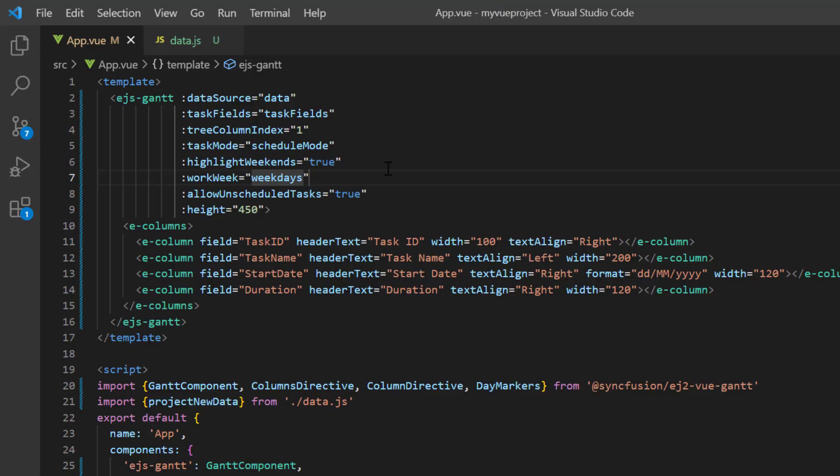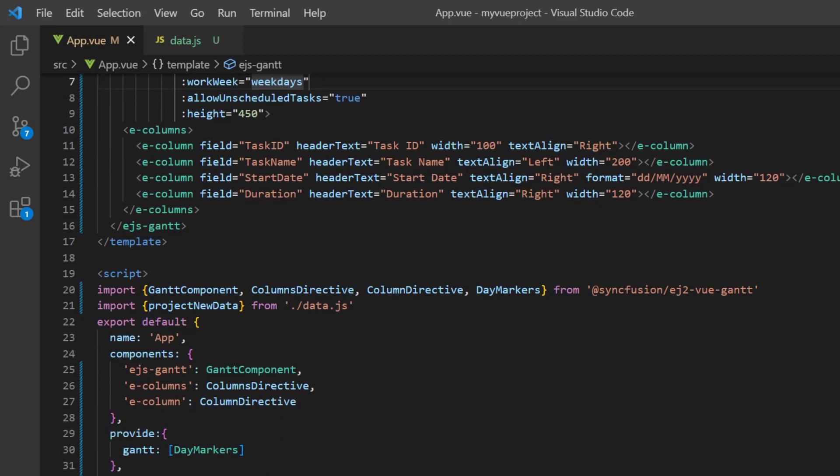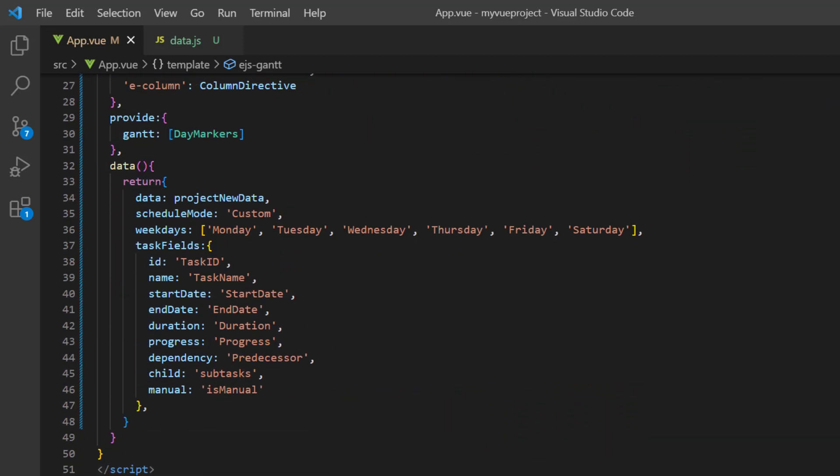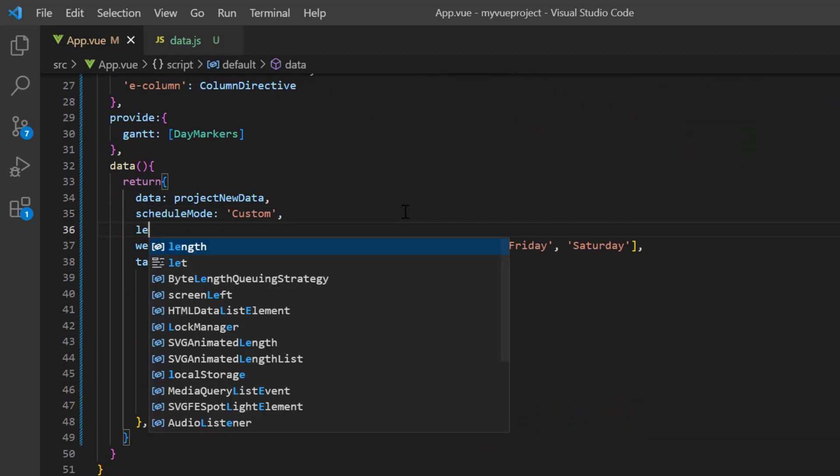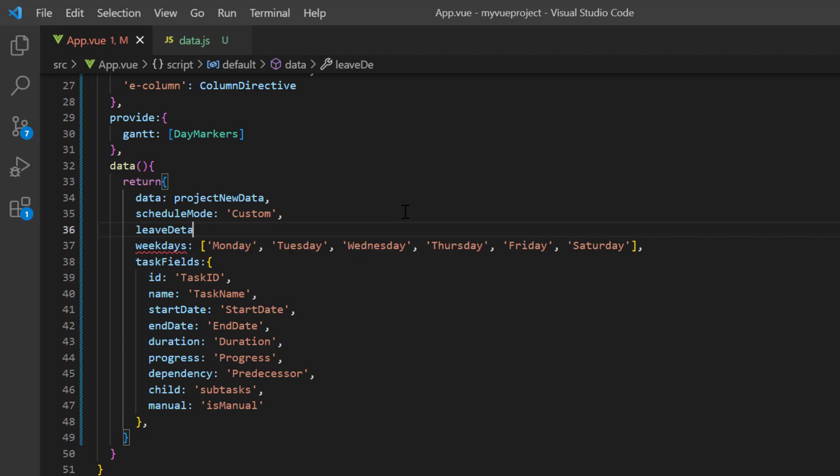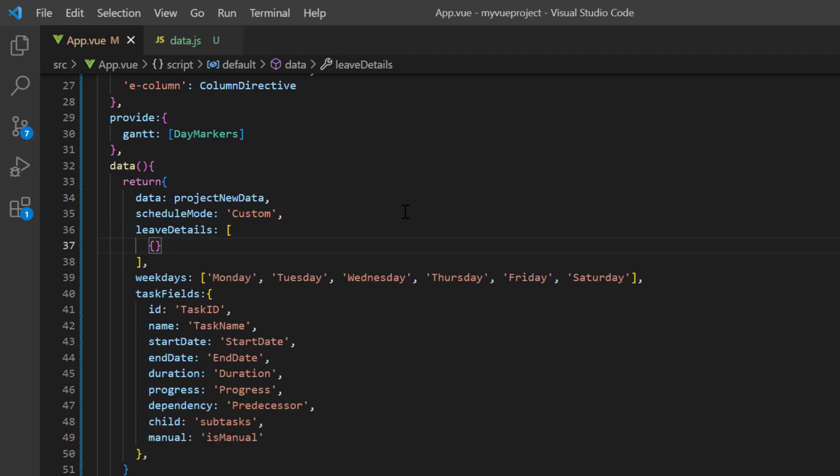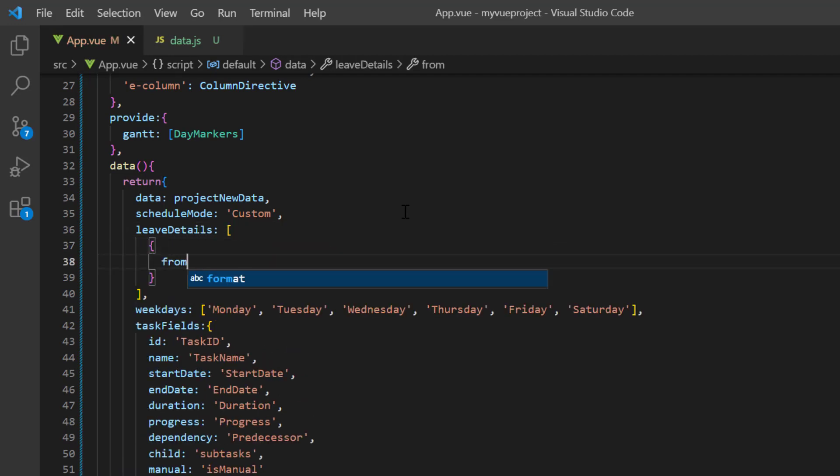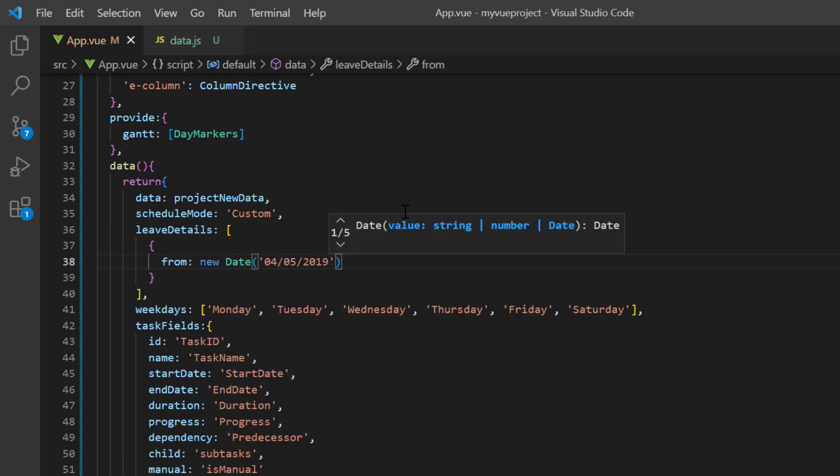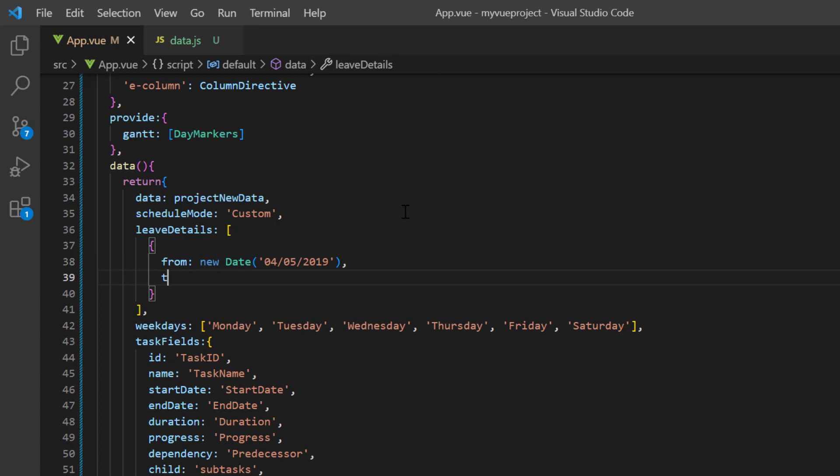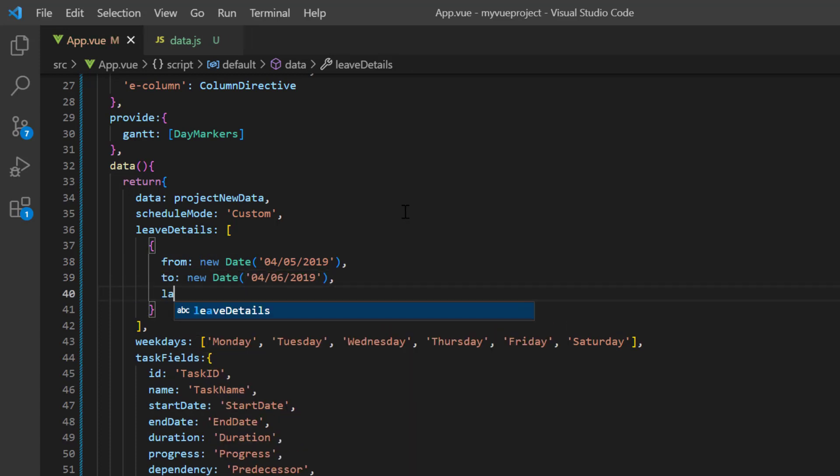Next, I will show you how to add holidays to the project timeline. I define the array variable leaveDetails and specify the holiday from April 5th, 2019 to April 6th, 2019, and the label is Good Friday.